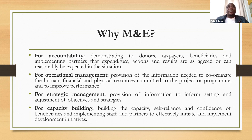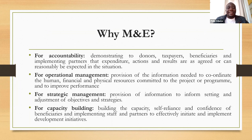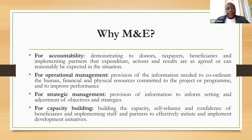M&E also helps in strategic management — whether to go forward with a project or do it in another way. And then for capacity building: from the evaluation we were able to do after our community failed to use the toilet, we were able to learn that it's never just about building a beautiful toilet that will motivate people to use it. We learned that the major reason was participation — we never had the community and their leadership involved in planning and execution of the project. So we were able to learn that for an effective project, everybody needs to participate. Through monitoring and evaluation, we learned that the community plays a very integral part in planning and execution.